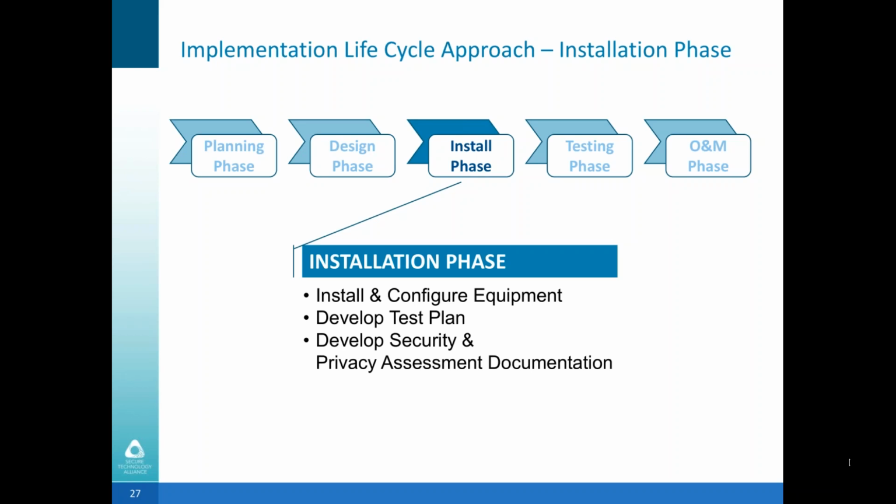Prior to deploying the head-end system to the site, and to avoid project delays, it would be advisable to set up the PACS at a staging area or in your offices so that the major functional components can be checked out and any necessary requirements can be taken care of in advance, such as updating software versions, testing reader authentication methods, etc. As the project progresses toward its testing and turnover phase, continue preparing the appropriate documentation and lifecycle management agreements to make the transition at that time smooth. Next slide, please.